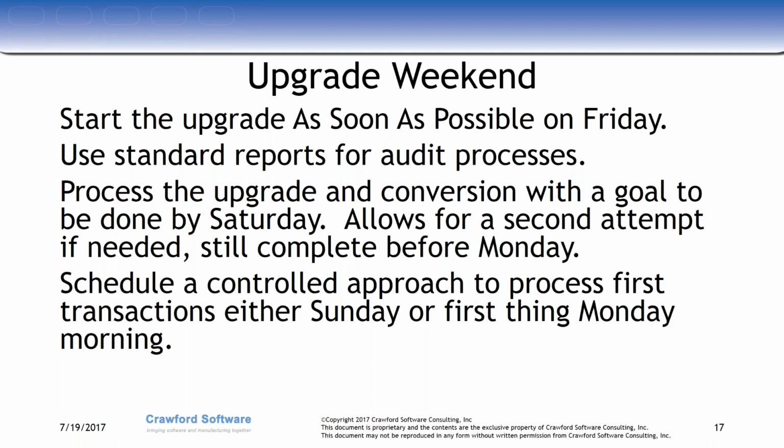And that provides a buffer that if for some reason there is a problem, I can re-execute it again starting on Saturday, still finish on Sunday, and still hand over an upgraded system to my end user community who's expecting it on Monday, and I still met my commitments to my business and to my management team. So that's why we do that.